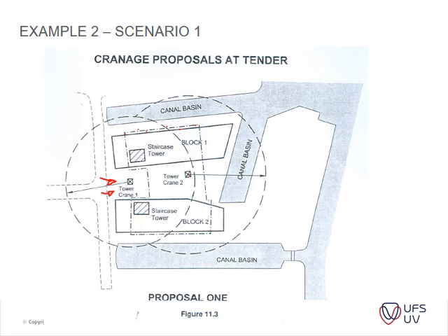Okay, are you guys comfortable with that? So it's just a method statement. This is how they thought about it. The 20-meter radius reach is not really necessary. There's something which I don't say here, that one should also consider, which is regulations: how far a crane can actually reach over a public road and into someone else's site. So that's something that one needs to consider as well.